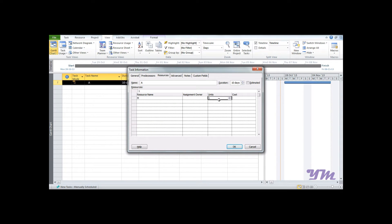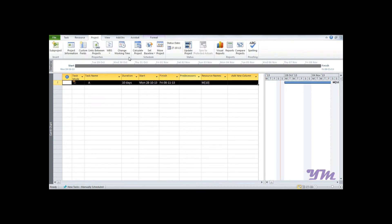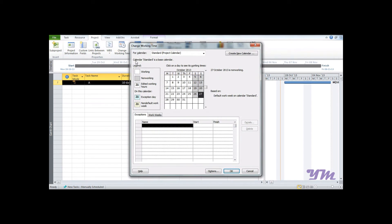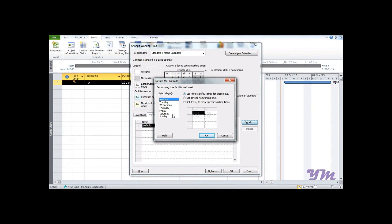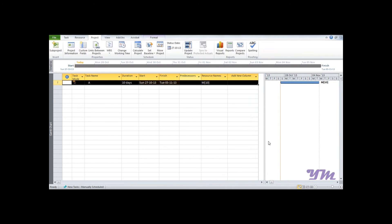To simplify the work, we will make the working time all seven days a week. Go to Work Weeks, Details, select all the days, set specific time, and click OK. All seven days of the week are now working and we have a project which lasts for 10 days.